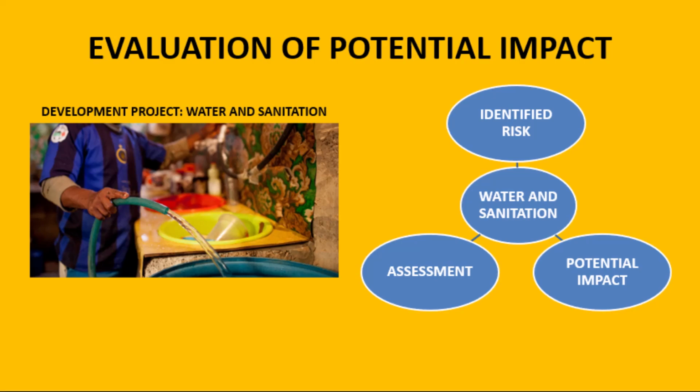They each involve a risk impact assessment, assessing the severity and the likelihood of each identified risk, prioritizing risks based on their potential impact on project objectives. And in each example, we saw examples of mitigation and contingency planning, developing strategies to mitigate the impact of high priority risks, which can involve implementing preventive measures, creating contingency plans, or establishing early warning systems.